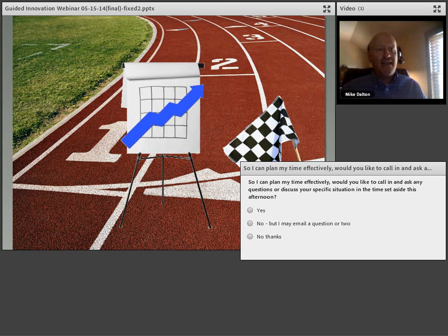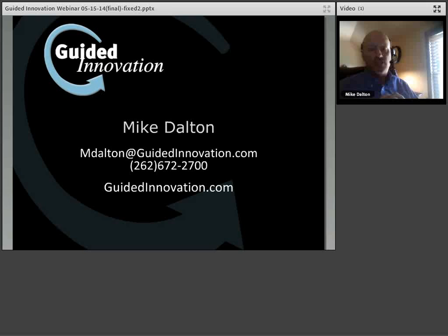So you can take advantage of those kinds of things if you know that it's 3 months for procurement. Another example would be, in drug development or almost anything that requires FDA approval, there's usually something like a 90-day waiting period, and having people sitting on their hands for 90 days doesn't make sense. When you model the project, you'll find that you can do other things.